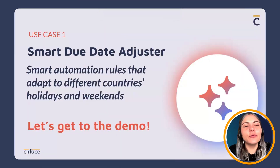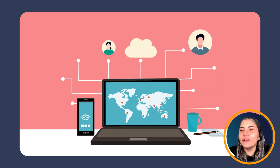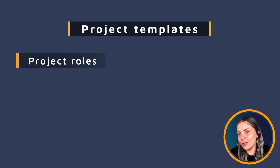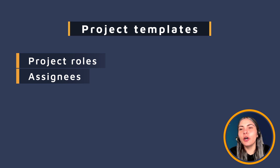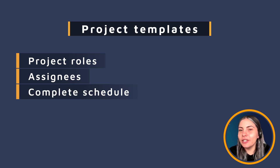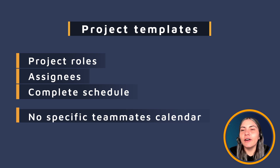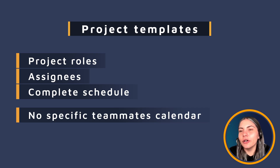For our first use case, we have what we call Smart Due Date Adjuster. We've seen while working with multiple clients that many have global teams distributed across multiple countries. Asana's project templates are great because they allow us to set up project roles and schedule based on start or due date. But until now, we weren't able to have specific teammates' calendars embedded into our project. A project manager would need to manually review and adjust any tasks landing on a holiday or a weekend.